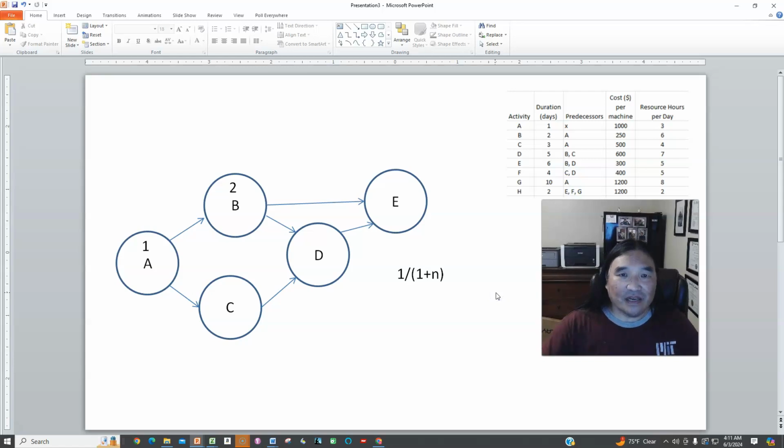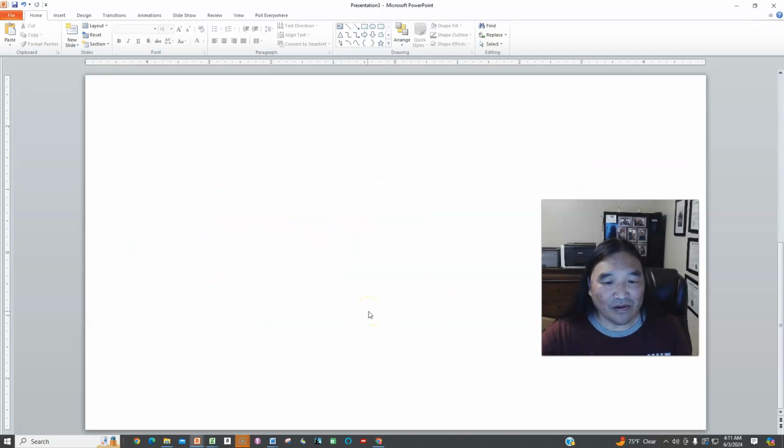Now, when do I want to be cutting down days? When I want to reduce the critical path. The other days don't matter; what matters is the critical path. You have to be careful about the critical path. Supposing you have one path that's 20 days, and I've reduced that down to 13 days. It doesn't mean the critical path is 13 days, because I have another path that's now 15 days. Now this has become the critical path. So just reducing one path doesn't mean you've reduced the critical path. Something new could become the new critical path, and now I have to spend money to get that down. And so it asks you to get it down below 12.